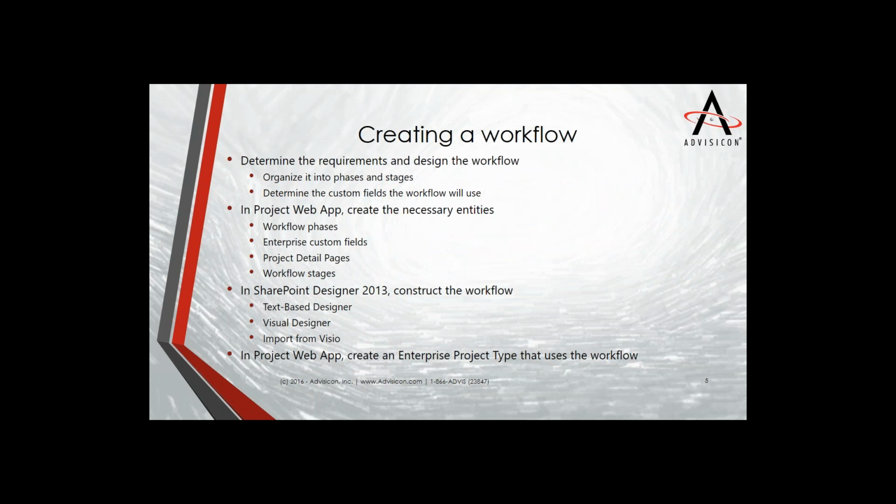and then designing the workflow. Think about, what is it that we have to do? Do we need to collect some information? Do we need to go through some decisions? Is the cost of the workflow over a certain amount, so it's going to require a different approval process than if it was under that amount? Those types of questions you need to go through and document them.